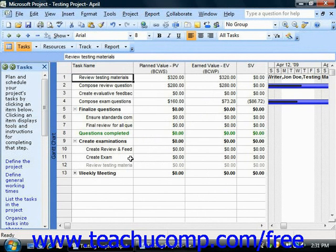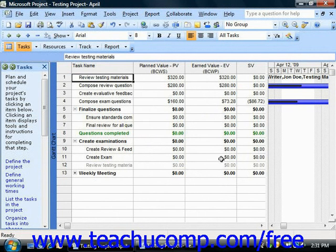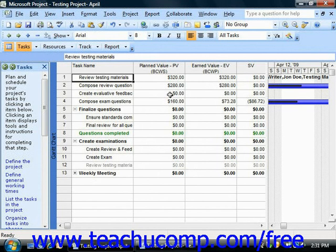Remember that these values are all set as of the selected status date for the project file, and you can change that date in the Project Information dialog box to change the numbers shown in this view. In this view you'll see the planned value, or PV as it's displayed in the column, which is the budgeted cost of the work scheduled as of the status date.